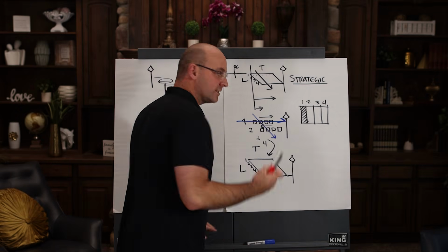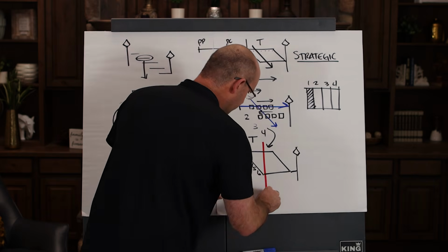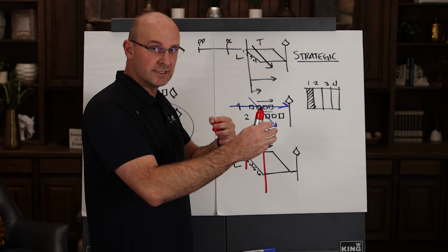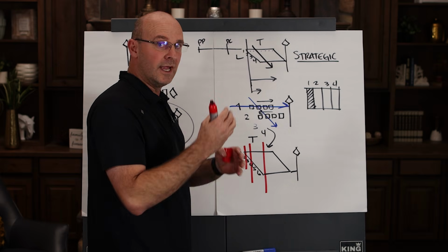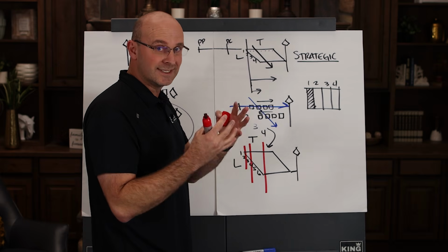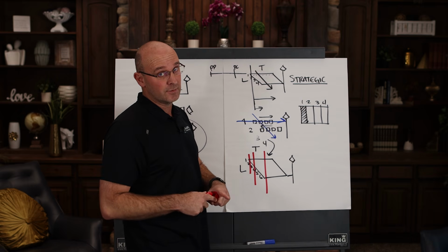So I'm gonna draw this in red. When we need a 6-week look ahead plan, we filter it from this plan and adjust as needed. When we need a weekly work plan, we filter it from this plan and adjust as needed, because the trades get to commit. The trades get to own these, but the trades also get to hit the milestone.